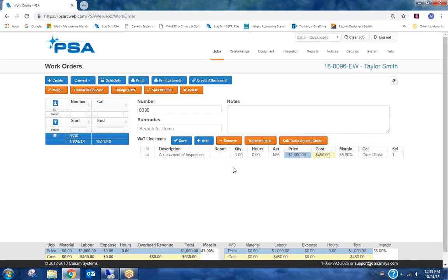After the actual estimate is completed, we would go back into that work order and modify this to the actual, if the estimate ends up being different than this number. It would obviously be reviewed, and if we have an approval date to proceed with the work, we would be going back into the dates of the job.